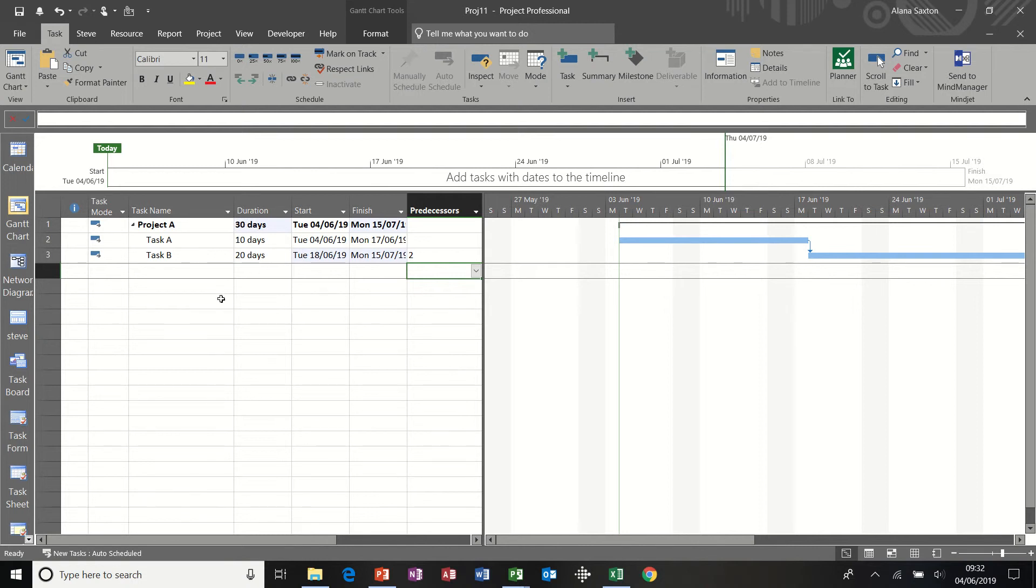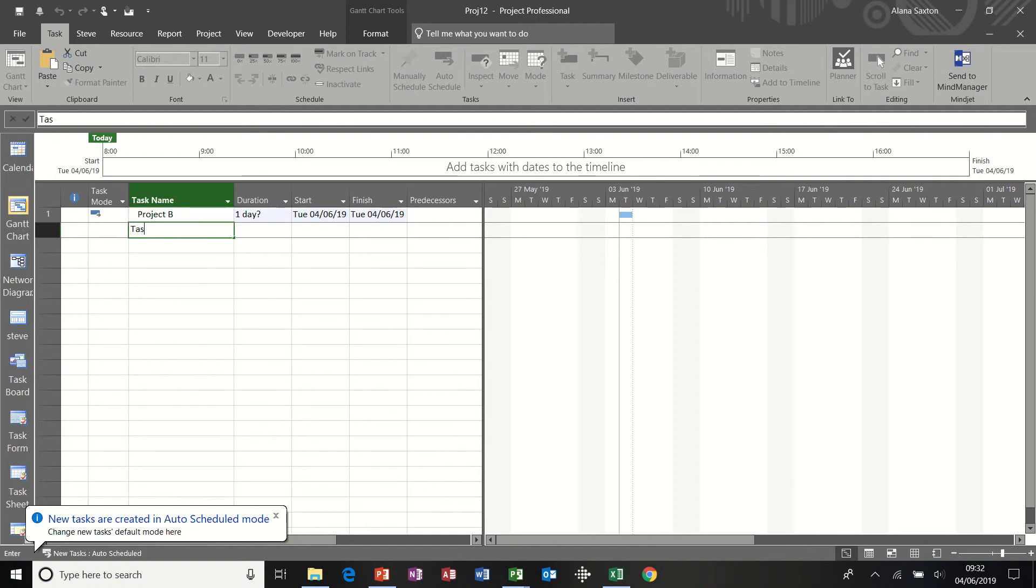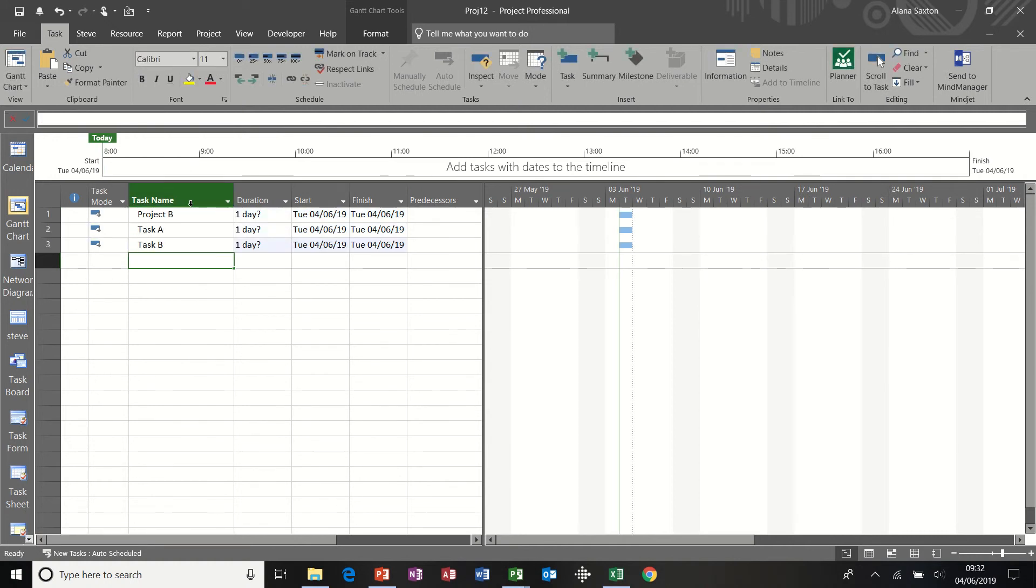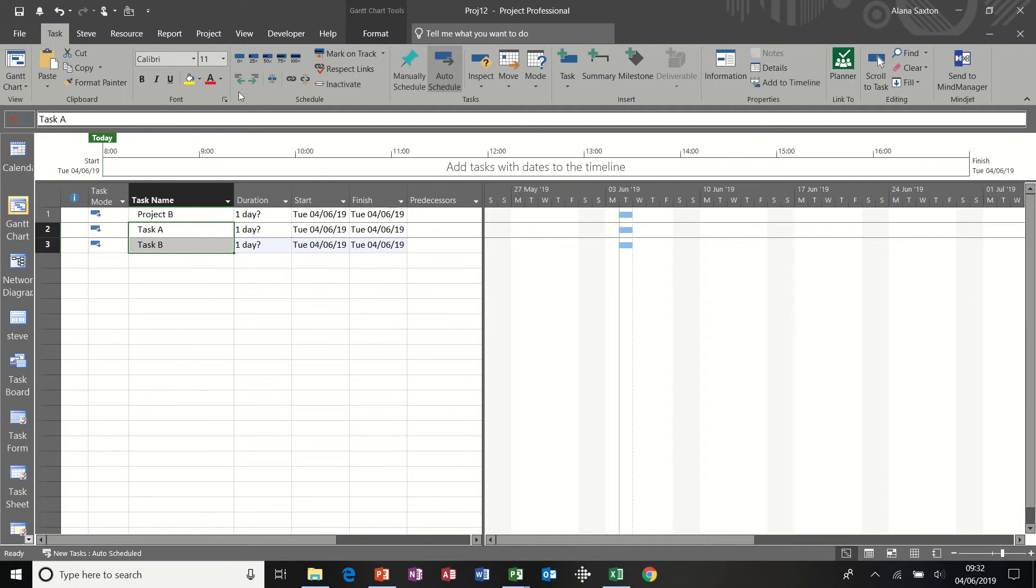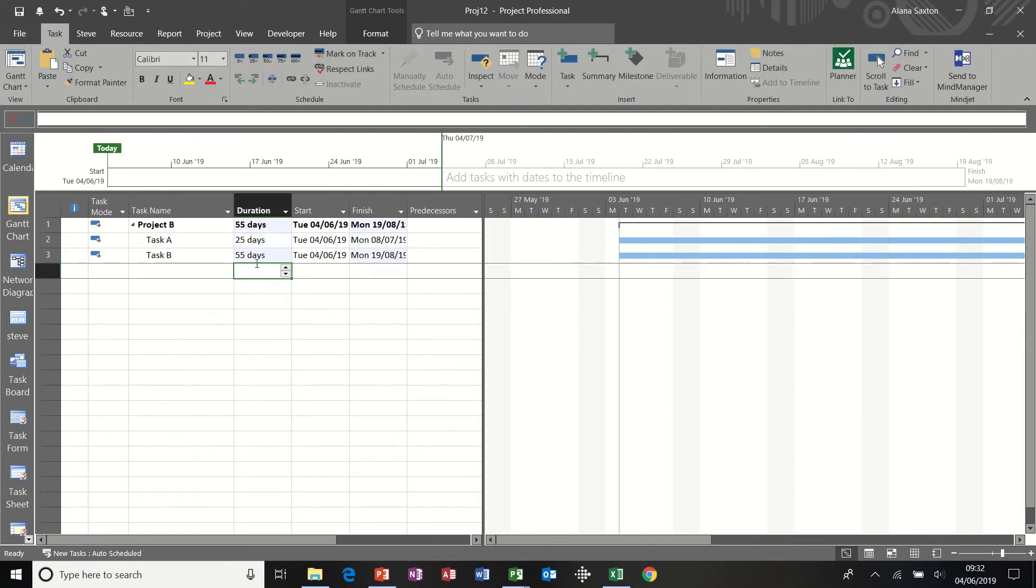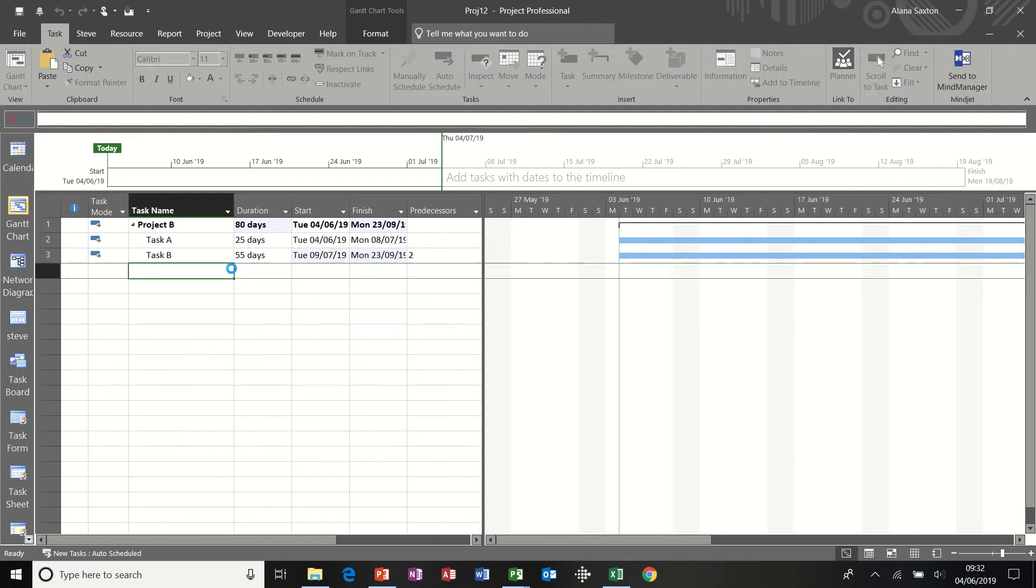New project. This is going to be Project B. Task A. Task B. Again, do the same thing. Indent. Give them some durations. 25, 55. And link them. So I've got myself two projects.